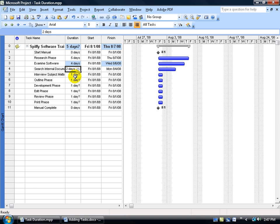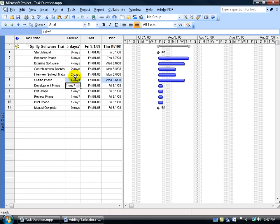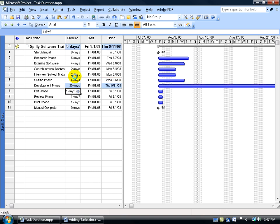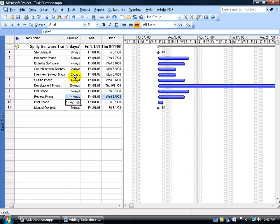I'm done with that. Let me hit enter and go down to interview subject matter experts, and do two days, four for the outline, development phase could be 30 days to write the content, editing, five days, reviewing four, printing, maybe two, and then I'm done.